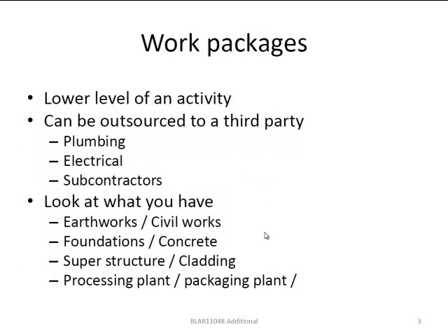Well, work packages are basically, if you think about an elephant and how you're going to eat an elephant, it is obviously you're going to break down the elephant into smaller pieces, and this is exactly what we want to do with a project. We're going to break it down into smaller pieces, so it's the lower level of the project, and it's typically a level 4 or a level 5 on a work breakdown structure. And a work package is basically something that you can outsource to a third party or a subcontractor, another contractor that can take care of that for you.